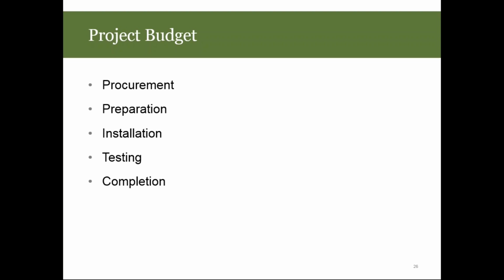Project budget, you want to make sure that you put in for the equipment, for the charging, for the maintenance, and you can also put in for training your staff that are going to be doing the maintenance.